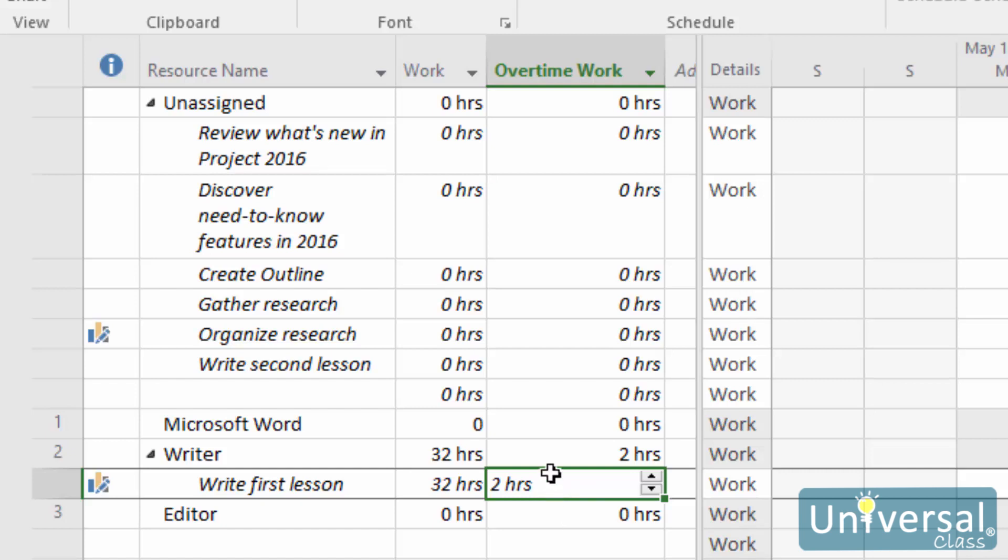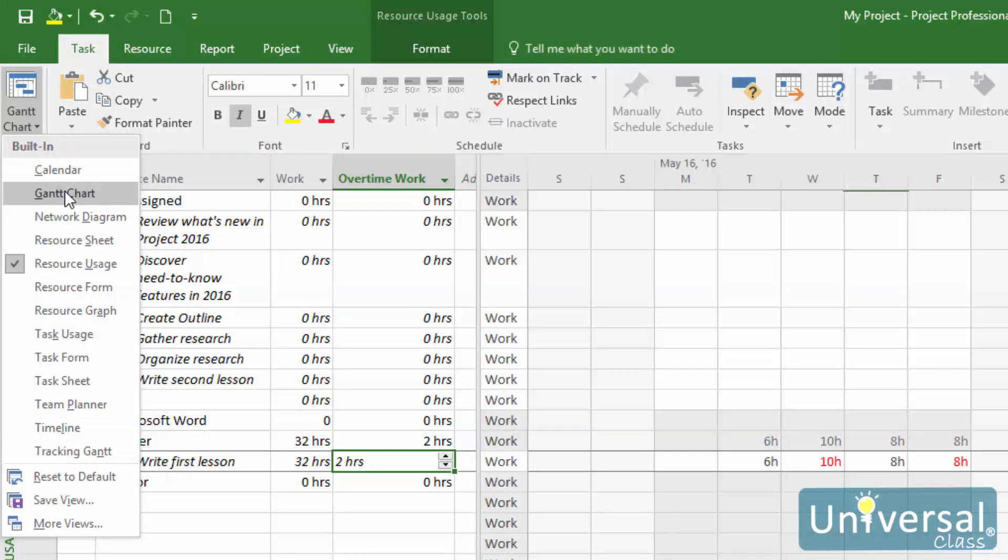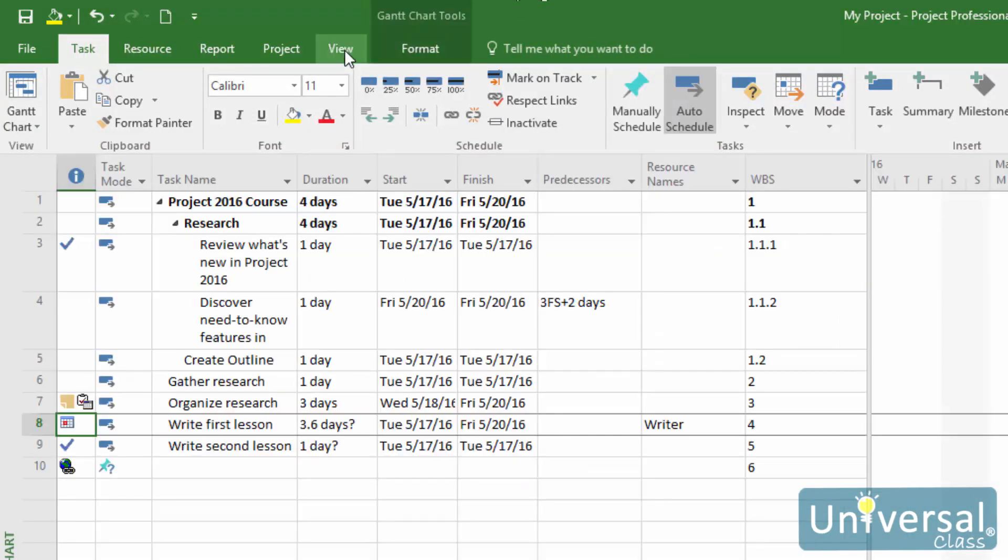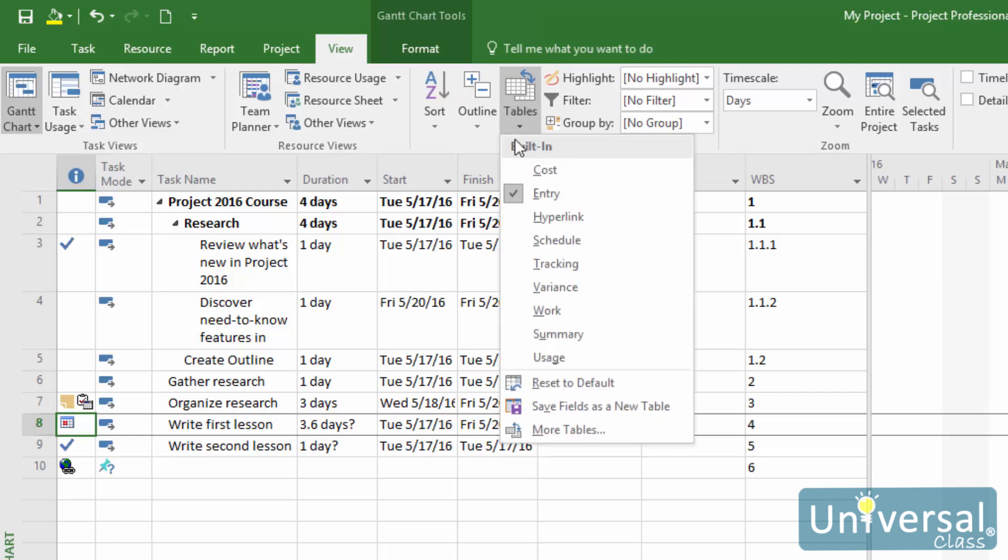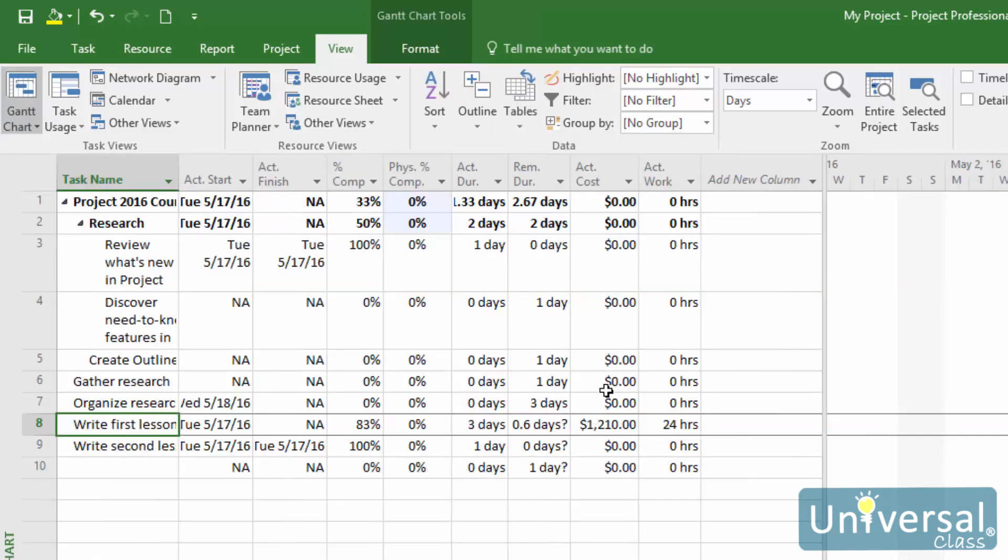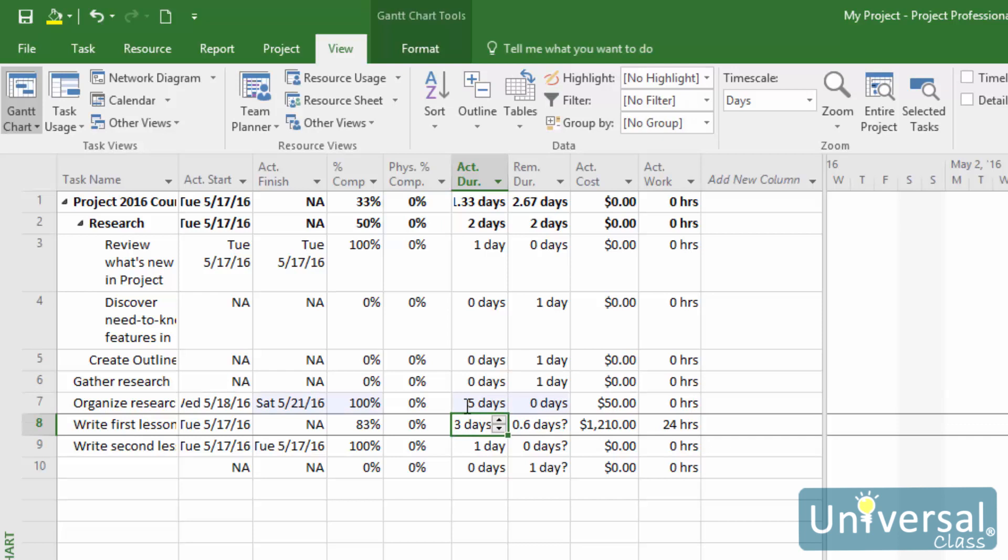If the duration of an auto-scheduled task has changed while it is in progress or already completed, you'll have to enter those changes into Project 2016. To do this, go to the Gantt Chart view, then go to the View tab and click the downward arrow for the Tables button. Select Tracking. The tracking table is then displayed. Go to the Actual Duration column for the task you want to edit, and enter the actual duration. You can also enter a remaining duration in the Rem Dur column, which stands for remaining duration.